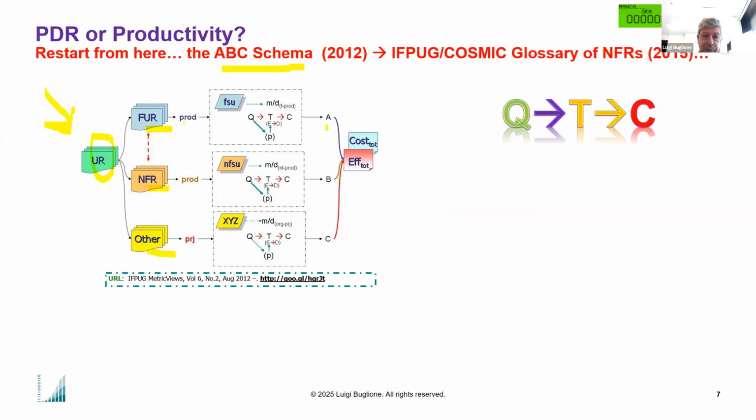Functional, about the product, that is the A stream. Non-functional, about the product, that can be called the B stream. And something about the project size for project or organizational tasks, that is the C stream. So each kind of sub-requirement type can be sized using a functional sizing unit, a non-functional sizing unit, and since there is no worldwide agreement about a project sizing unit, often these tasks are just managed with an estimation by experience in man days.